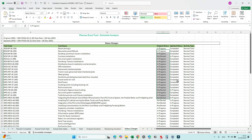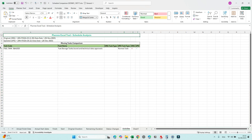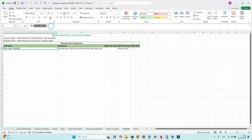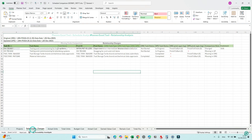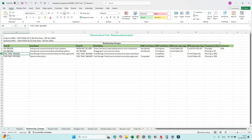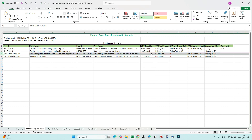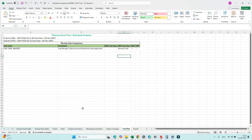Status Changes: all these activities converted from In Progress or Not Started to Completed, or from Not Started to In Progress — which is acceptable. The new activity identified here (fuel tank) is the one that appears in the Relationship Changes section without an original status, confirming it is a newly added activity. This was a quick review of an XCR update — you can of course dig deeper into the details.